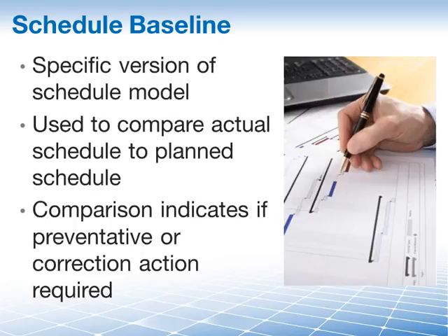And since we have to pay, for example, resources that are going to be working on these activities, that means that the schedule baseline allows us to determine when the expenditures, when the cost will happen. That's the reason why we use the schedule baseline as an input to the plan cost management process. It allows us to see when cost will occur.